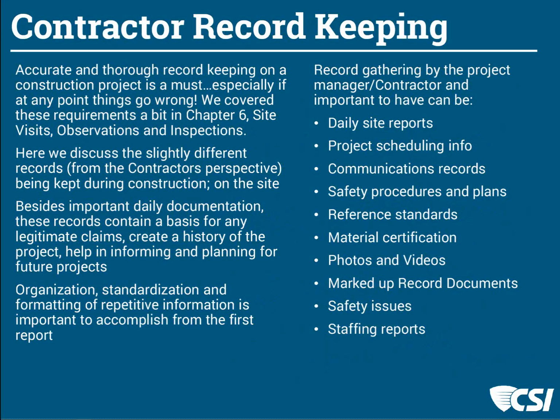And that's what we hope for. But in cases where that doesn't happen and there is some follow-up or there are issues to manage, either mediate, arbitrate, litigate, these records are really important. I often see contractors who aren't doing this. They're not filling out information on a daily basis. They're not marking up their record drawings, which will take us to the next